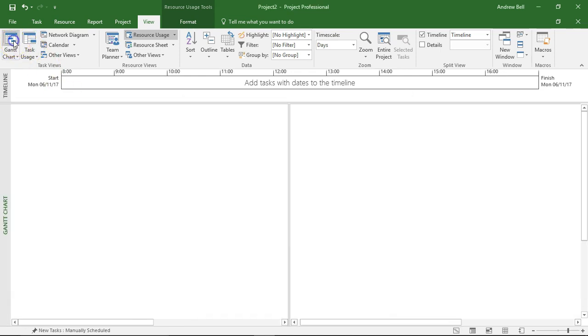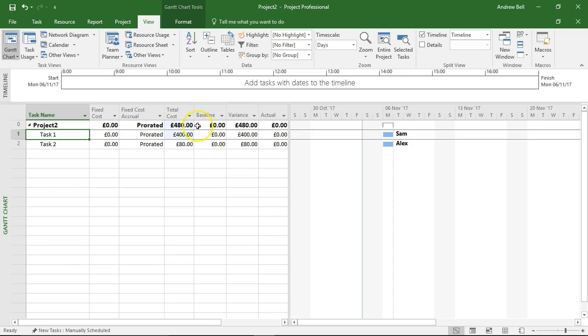Let's go back to the Gantt chart view and there we can see the total cost is now increased by £320 making it £480.